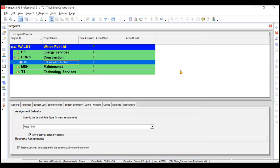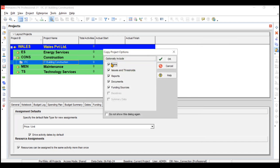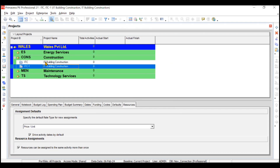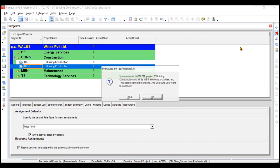One last thing: you can copy, cut, and paste projects. From the command bar, copy this project and paste it. It will ask what you want to paste - for example whether to include risks. We'll say no to risks and click OK. It may ask about WBS milestones - click OK. A new project has been copied, similar to IT Building Construction, but with ID ITC1 since IDs must be unique. We'll delete this copied project since it was just for testing.